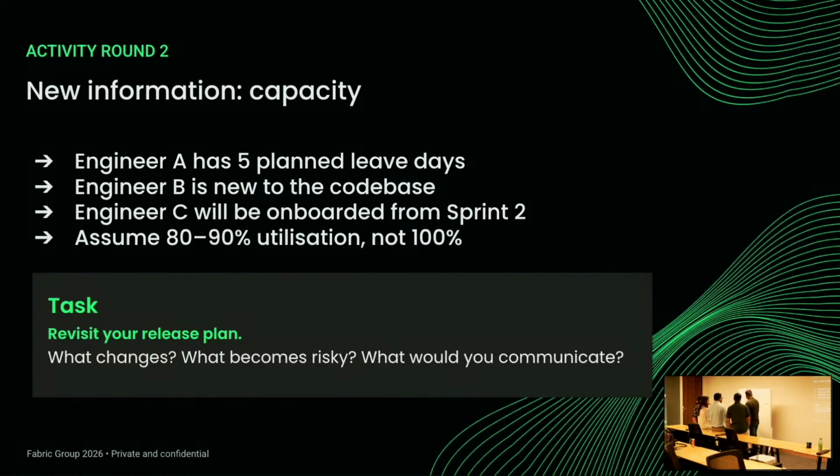And sprint 2, similar thing, right? 30 is the number of story points here. So the second person is onboarding, right? So let's say that 5 points is gone because they'll take at least 1 week to ramp up.